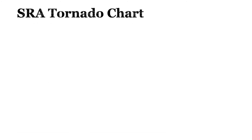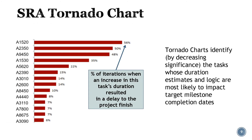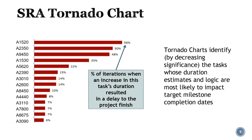This graphic on the left is a tornado chart, and it lists the tasks whose duration estimates and logic are most likely to impact the project's end dates. In this case, task A1520 resulted in a delay to the project's finish date in 56% of the iterations. These results allow the project team to take action on the specific tasks which are most responsible for the results of the SRA.